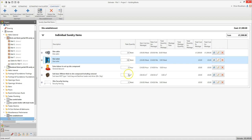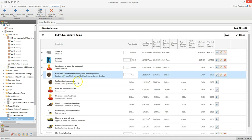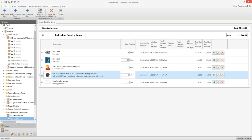Type in the area of the site compound here if you need one. If we click on the plus button to expand the rate you'll see that it includes sub base, plant to prepare and remove the sub base, and also the labourers' time to place and compact the sub base. You can add extra hours of general labourers' time to set up the compound here if needed. Here you can also add security fencing.